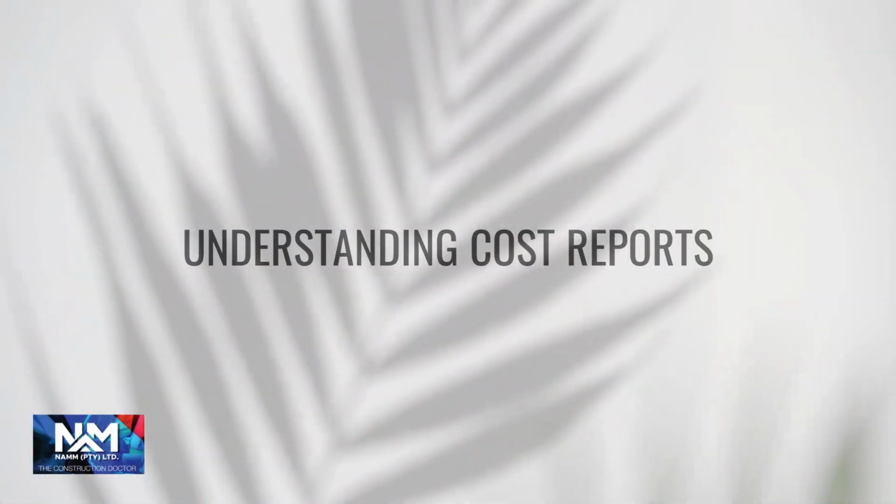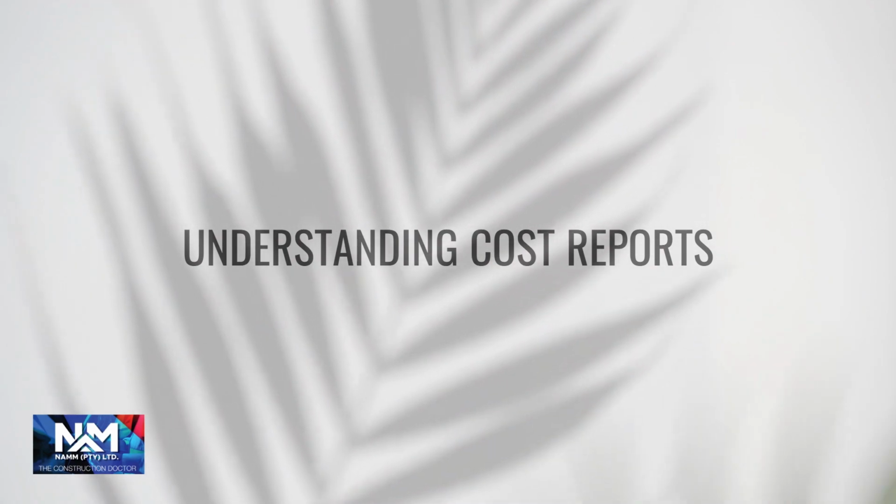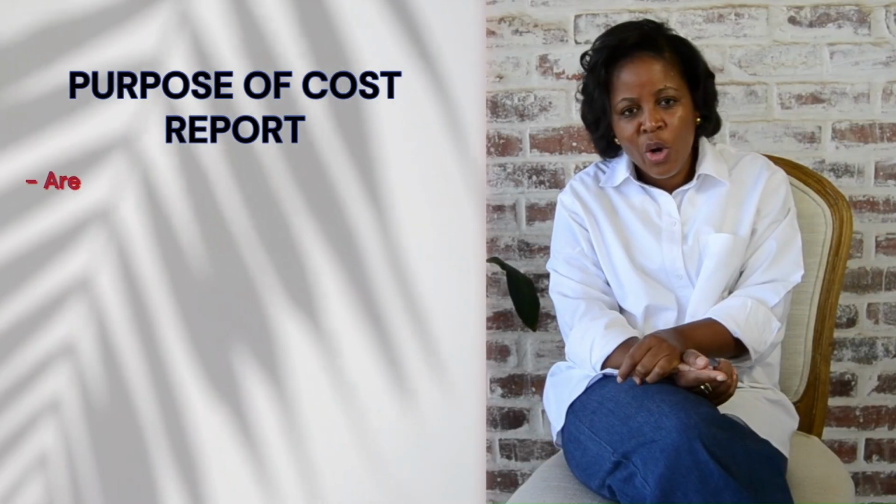Everyone. Let's talk about cost reports and what they are used for. Essentially, cost reports are used by quantity surveyors to monitor and control the budget. On most projects, this is usually done on a monthly basis. The bottom line that you are trying to answer from the cost report is: am I still on budget?